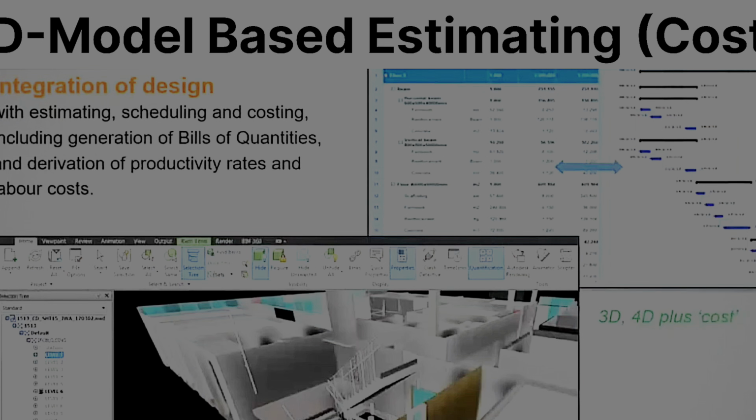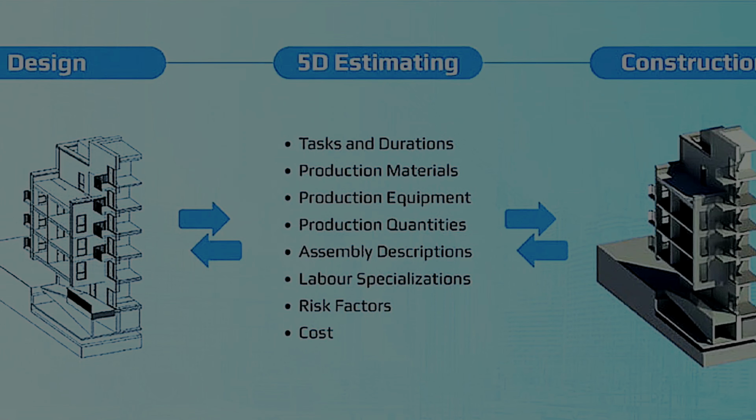So the same example again. Let's say the project is starting next year. If I have a 5D BIM model with me, I can accurately estimate what will be the cost incurred in the month of January, what will be the material cost incurred in the month of February. I will be able to extract the information of cost for future construction activities. Right now itself I can have an understanding.